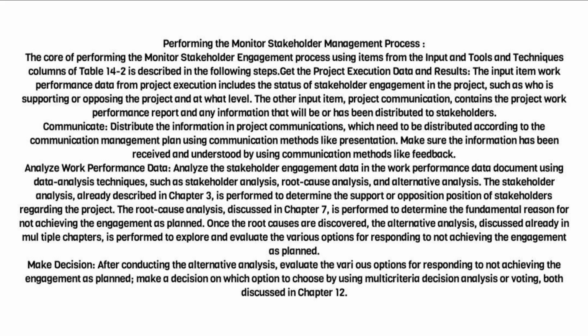Make sure the information has been received and understood by using communication methods like feedback. Analyze work performance data. Analyze the stakeholder engagement data in the work performance data document using data analysis techniques, such as stakeholder analysis, root cause analysis, and alternative analysis.